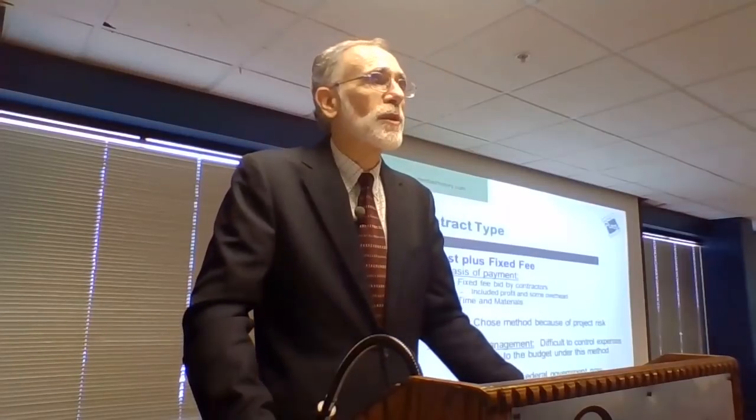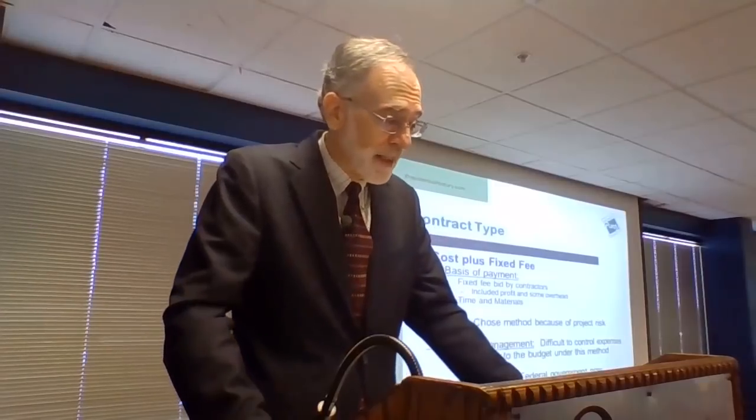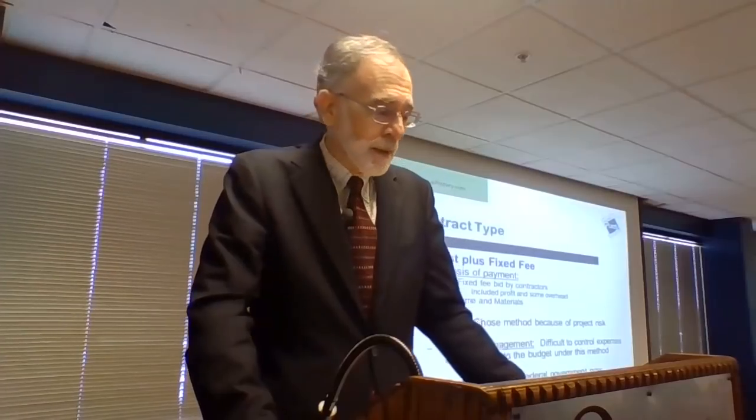The contract type that they settled on is a fairly risky type. It's since been outlawed by the federal government, and I don't think state and local governments use it very much, but it is called a cost plus fixed fee contract. And basically the contractor bids on just a fixed fee. So they're bidding just the cost of their overhead and profit. And then the owner agrees to pay the contractor on a time and materials basis. So in other words, whatever it costs the contractor to construct the project is what they'll pay the contractor.